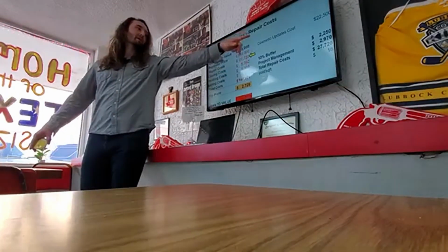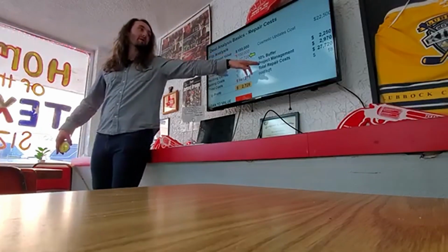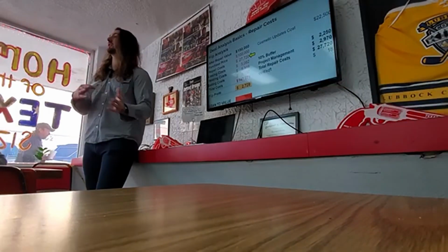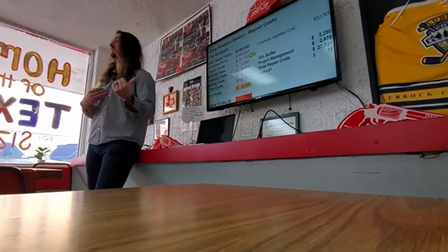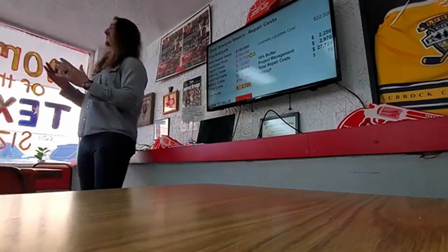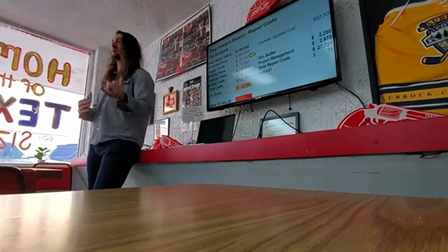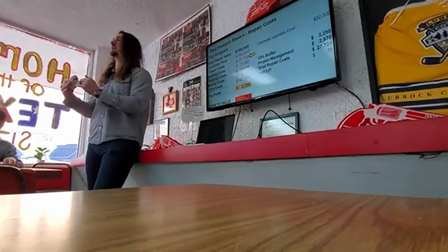So we add in a 10% buffer. Now, how we use this to help us scale is we build in a project management cost. For my company, that allows us to have someone on our team that we can pay a salary to, and pay a bonus whenever they are completing projects like this, and they can oversee that. Our ability to do 5 deals instead of 1 deal isn't limited by my time. We build it into our deal analysis so that someone else can handle it.